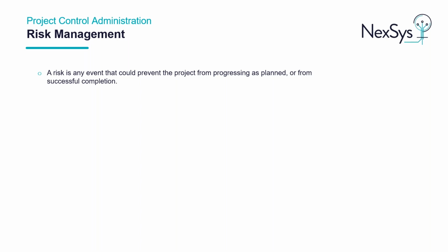So a project risk is an uncertain event that may or may not occur and could prevent the project from progressing as planned or from completing successfully. Risk management applies throughout the project scoping and lifecycle of project delivery. Risks can be inherited from the project or from external influences and can be identified through considering the project objectives and deliverables, reviewing project documentation, hosting a risk review session with the project team, and looking back at lessons learned from previous projects delivered.